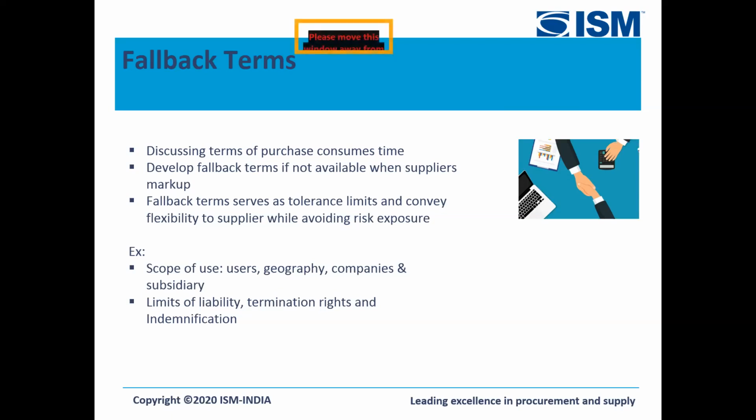So there should be some fallback guideline, whether if you are able to see that risk is low, the 1x or the 2x of the project size is good enough as the limit of liability, and that would close that question there, and it would just require legal confirmation rather than consultation, and the redundant communication can be ruled out and reduce the time here.